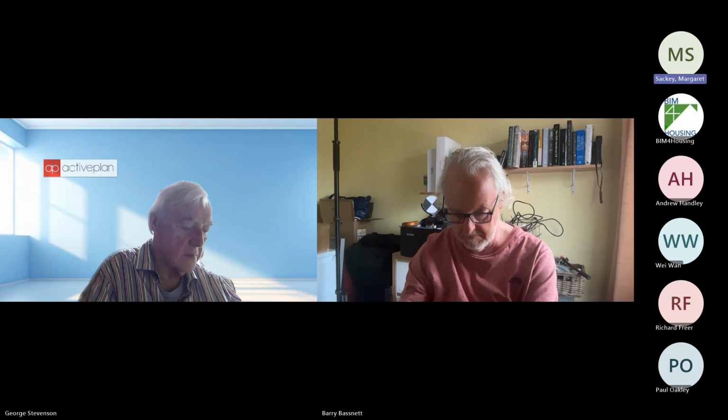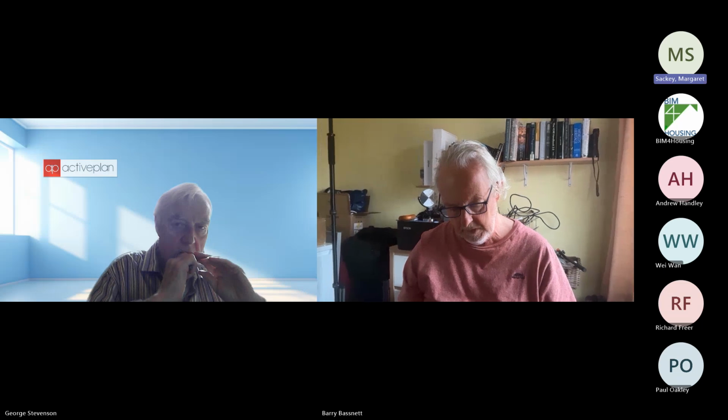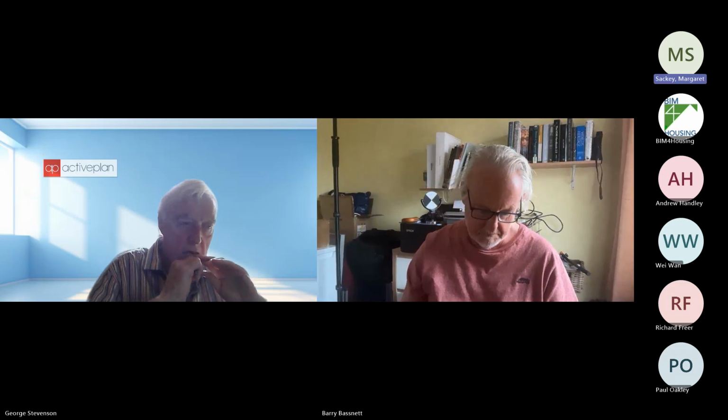Most definitely. But there are standards for these shells, and those standards will hopefully be the basic information that you would use to create and provide that basic unit. And then obviously if somebody wants more than that, then that's it. But what I'm trying to understand is why clients do not engage sufficiently with those who are going to use the thing in order to, as far as you can, deliver. When I first came to this organisation, a project was delivered with a list of 50 items at handover that were not delivered because they didn't engage with the end users.